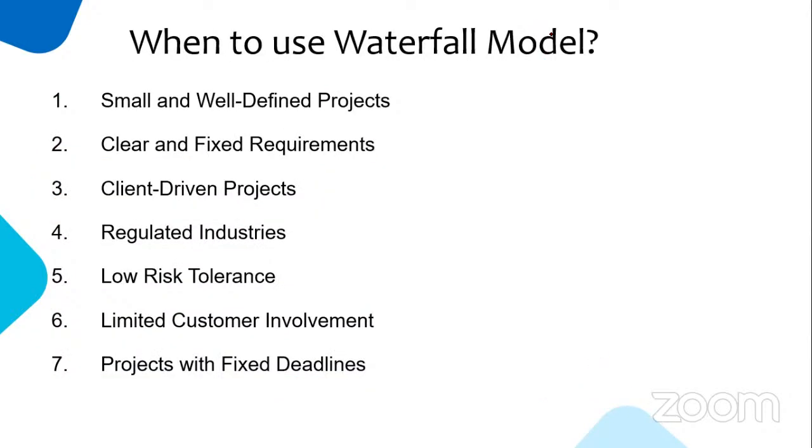Then, when can you use this model? This is a famous interview question. You are saying there are many pluses and minuses. Is it really used? Yes. If it is a small and well-defined project, where we have very good, fixed, clear requirements and everything is client driven. The client already came and said, see, these are the 10 requirements, go and start the development. That's it. Fully driven by the client, customers, regulated industries, very low risk tolerance.